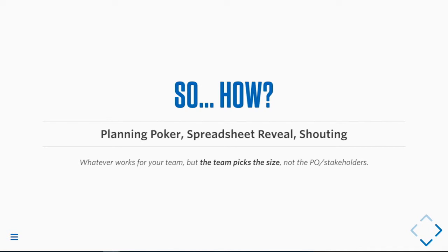If a team feels kind of stuck on something, that person can prod them on, well, is this easier or harder than adding a link field to the page? The PO can ask if there's a way to trim complexity so that something would be less complex to build, but the PO cannot dictate the size of a story, nor do they get a vote.